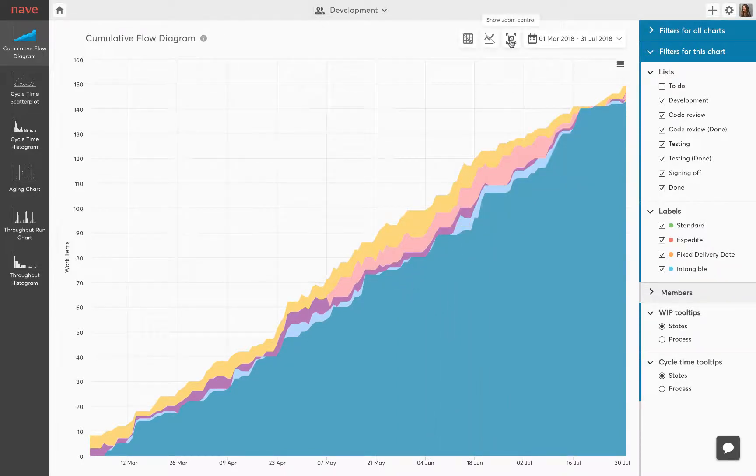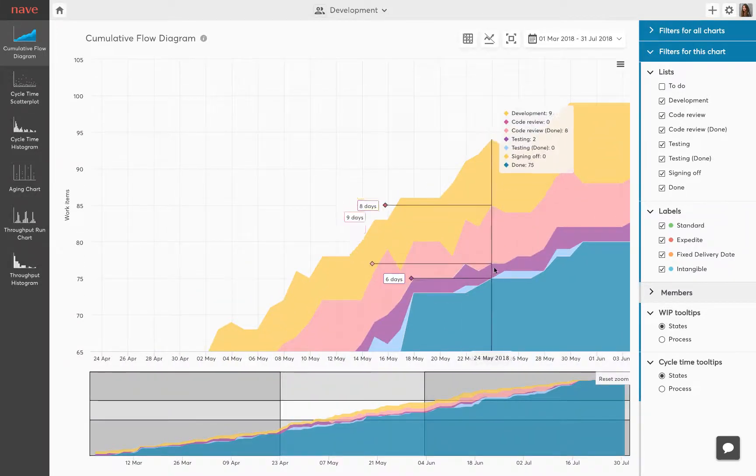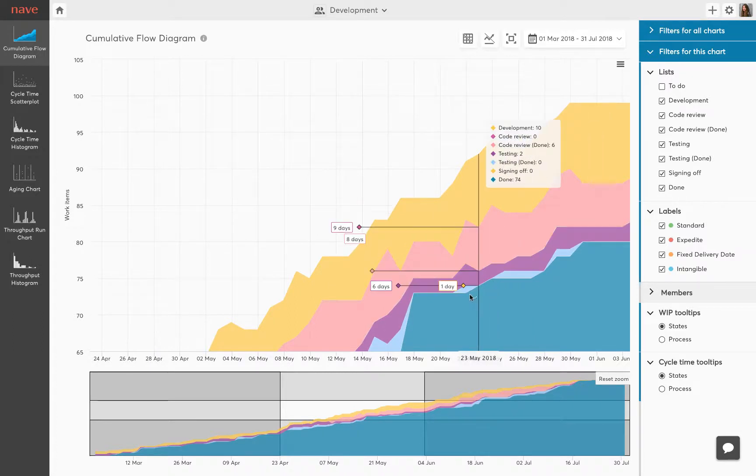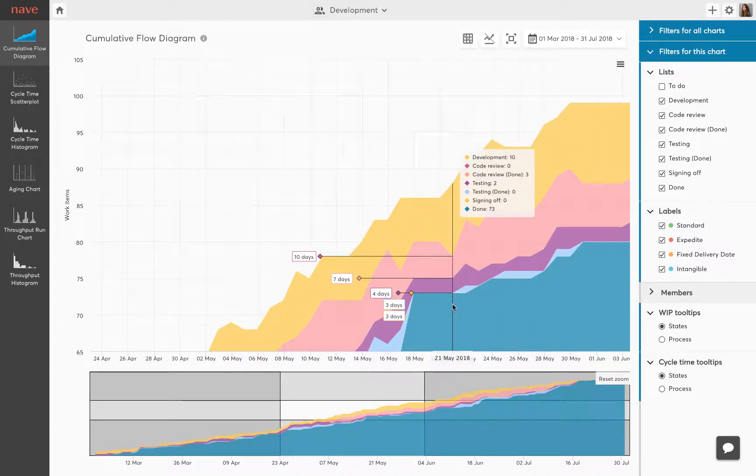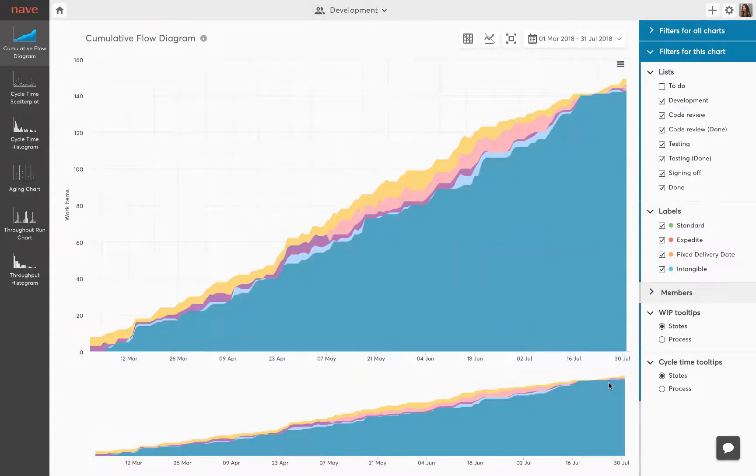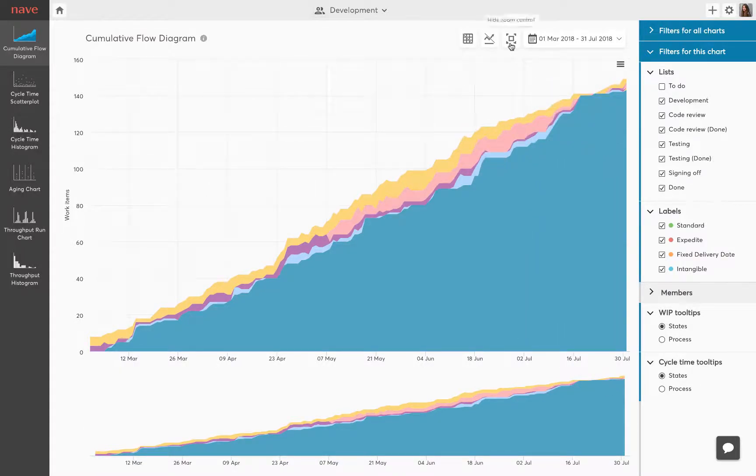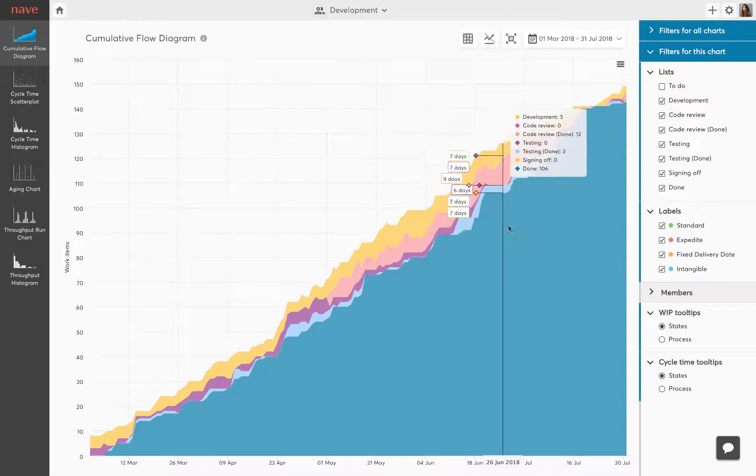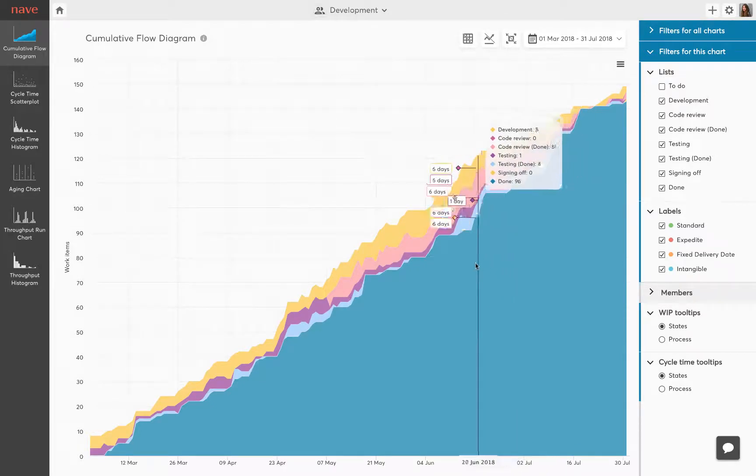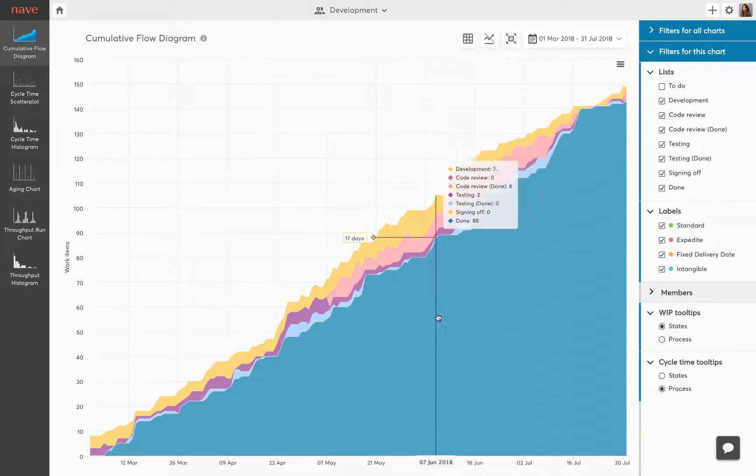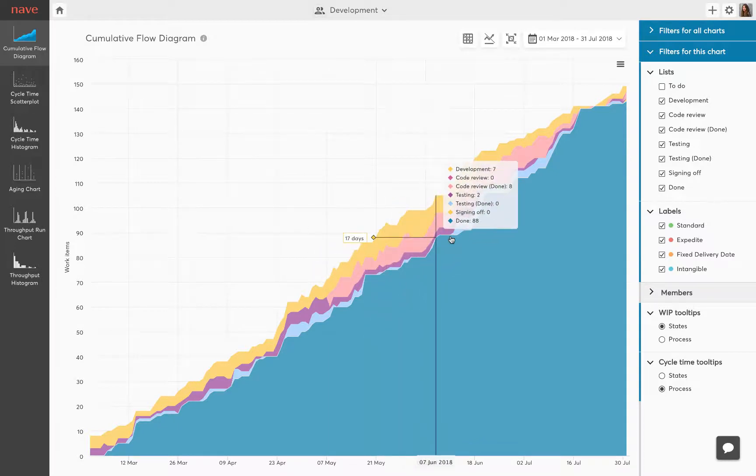You can zoom into a certain section for a more precise overview. Remember to account for any changes like team size or public holidays before jumping to conclusions. This could provide explanations for unexpected spikes in activity. The horizontal distance between the top and the bottom line of a CFD area at any point along the graph is your process approximate average cycle time.